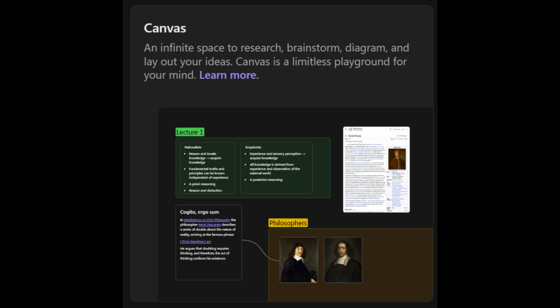Speaking of tips and tricks, are there any Obsidian plugins that you find particularly helpful? Oh, there are so many. If I had to pick a few, I'd say Data View is great. It lets you query your notes and create dynamic tables and lists based on the information they contain. It's really powerful for analyzing and visualizing the information in your vault. So, for example, could I create a table that shows all the tasks related to a project, sorted by due date or priority? Yeah, you can. It's like having a built-in reporting tool. Helps you track your progress, identify patterns, and gain insights from your notes.